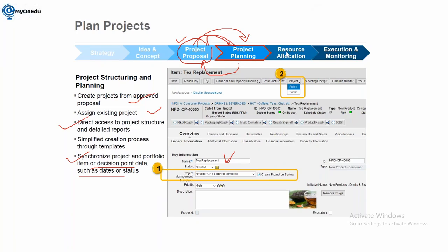based on the role, qualification, location, and availability, we can search the best suitable resource from the SCM system. Okay, so here we are having a concept of extended staffing, resource planning, like how an IT company is working. Let's say you are the manager and you are looking for some expert, let's say some PPM consultant. So you will ask your resource manager, who will check in the system based on the required JD, job description, and then the system will find the best suitable resources and will propose. And then the resource manager needs to assign the same resource here in the project.